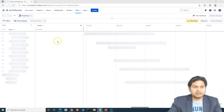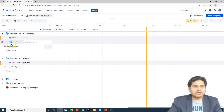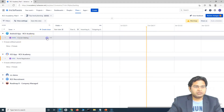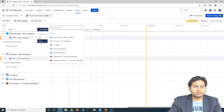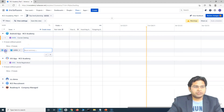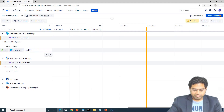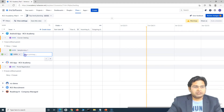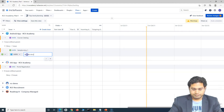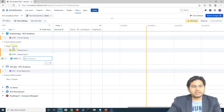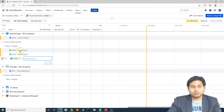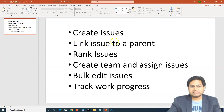I'll add the course catalog in a different project and let's add one story each. So I want to create an issue — I'll say story, choose Android app, select the story type from the dropdown, and add sample story one and sample story two. As soon as I create those, you will see that these two issues are without a parent, meaning they are not assigned to any parent issue. This is the second point we want to cover: how to link an issue to a parent.